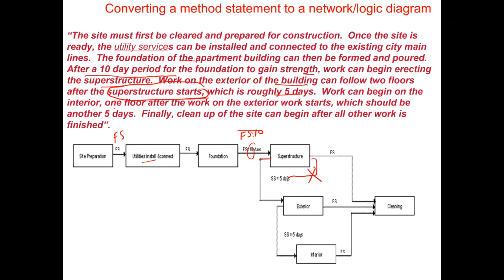Work can begin on the interior 1 floor after the work on the exterior starts, which should be another 5 days. So the interior again has a start to start relation with the exterior activity with a lag of 5 days. And then finally, cleanup of the site can begin after all the work is finished. So cleaning up is the last activity.